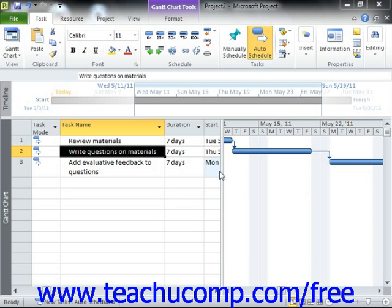In Microsoft Project, the available task constraints are grouped into three main groupings: flexible constraints, semi-flexible constraints, and inflexible constraints.